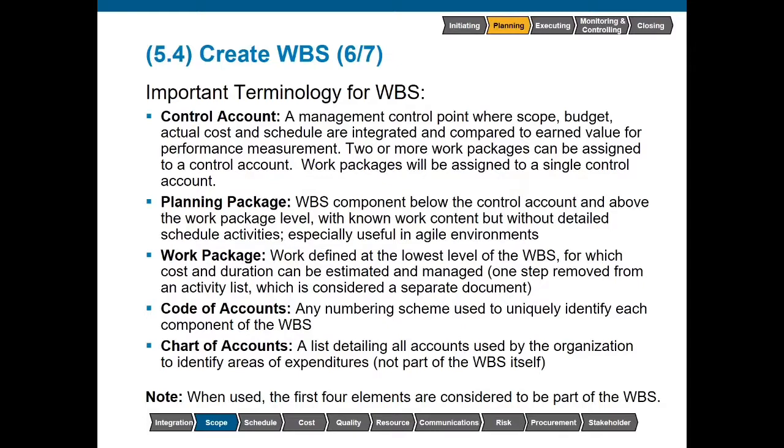These control accounts, this is where we go ahead and evaluate the work that must be done versus the amount of time that we have to do it versus the amount of money that we've allocated for it. This allows us to go ahead and make more informed decisions through the use of earned value management. If I were only to tell you that we completed 40% of the work, that doesn't tell you anything about whether we're ahead of or behind schedule or above or below budget. So by looking at all of these things brought together, the control accounts will allow us to make more informed decisions.